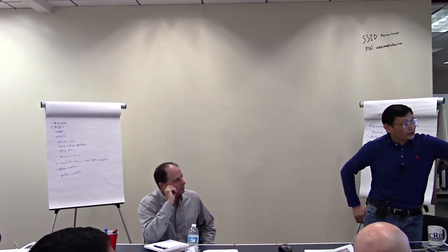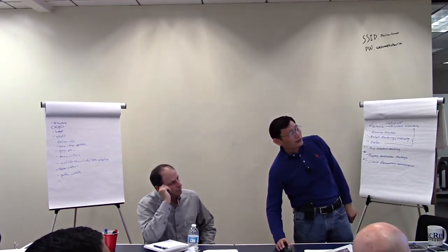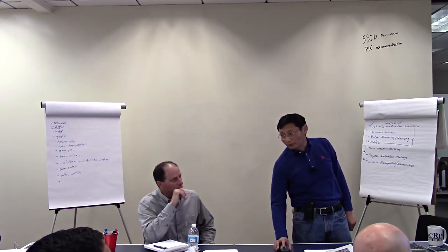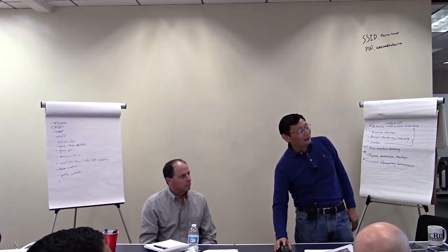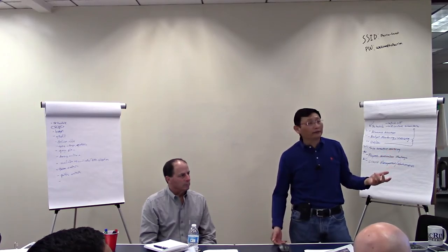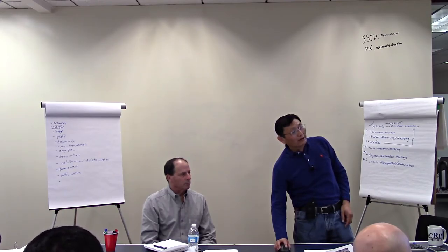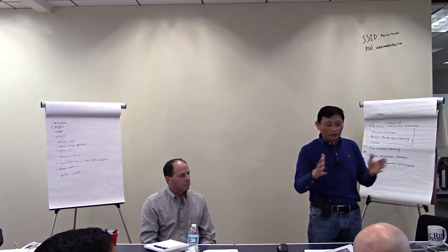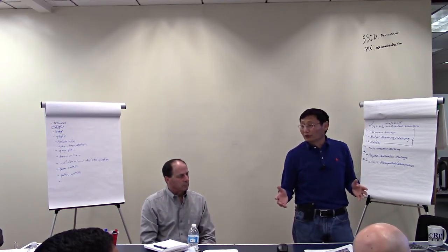This is what you would do according to the scope of work in the proposal, and you break it down a little bit further for how you want to run this project. It could be similar to what you stated in the proposal, or slightly different, depending on the situation. Obviously, the schedule has a starting time and a finish time, but very importantly is this relationship: what is the predecessor, what's coming in? Certain tasks have to follow a previous task because of the nature of it, and that needs to be reflected.